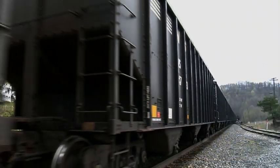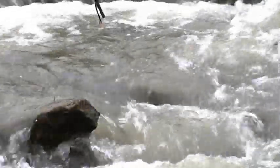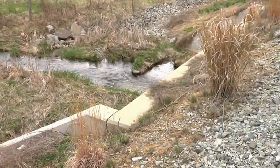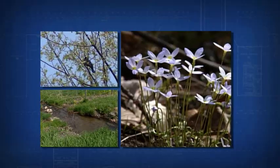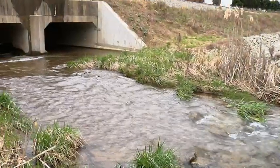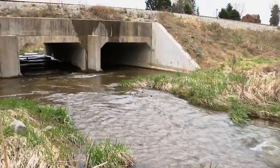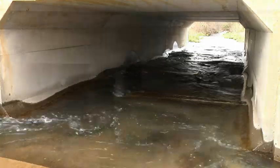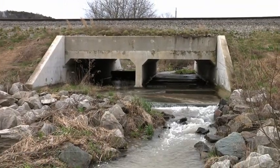While the freight transportation benefits of the project were obvious, other factors would significantly increase the project scope. For example, the plan took into account the project's impact on nearby streams and wetlands and their wildlife. Some 50 culverts would have to be built. From an engineering standpoint, no two culverts are the same. Each culvert has to be custom designed and constructed based on the amount of water flow that's anticipated at that location. Of course, the addition of these 50 custom designed structures over and above what we originally anticipated the plan to be figured a lot of extra money in the final project cost.